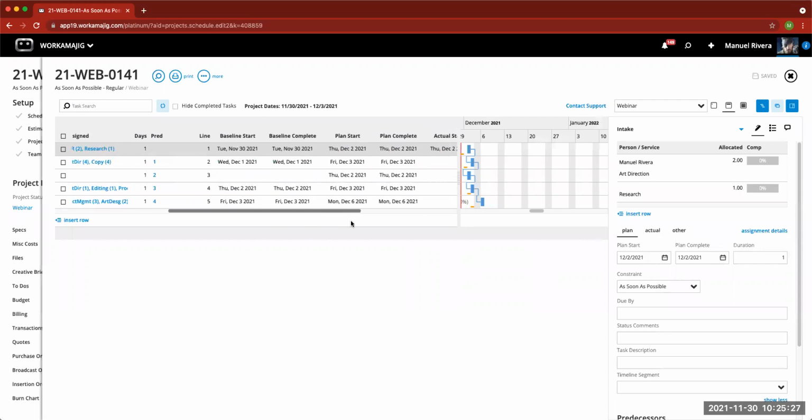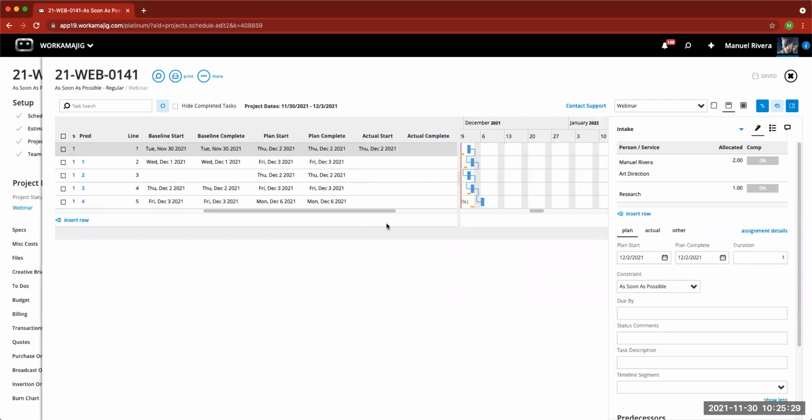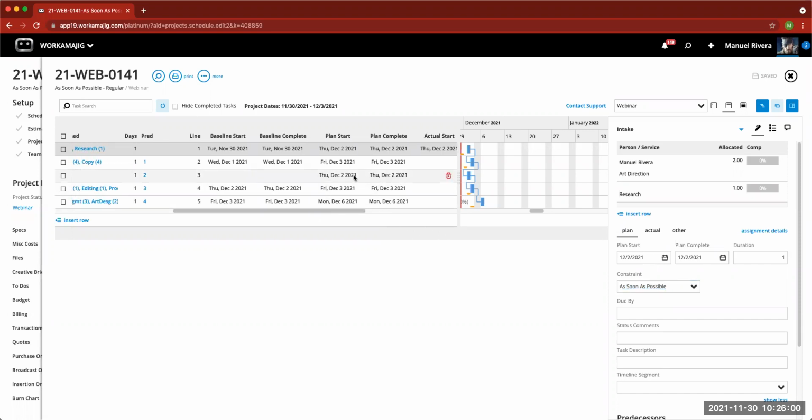always create something that's perfect in a perfect world, but how close can we get to it, and be able to come back to it and do a post-mortem analysis or a during-the-project analysis of why are we behind, why maybe we're ahead of things. And that's where the other benefit of the constraint as soon as possible is, which is the default, is that you get to see things done as soon as they can, right? Something gets done early, well, obviously it's going to pull the project to move forward, move earlier. And obviously it's still not moving your dates for those that are the constraints.